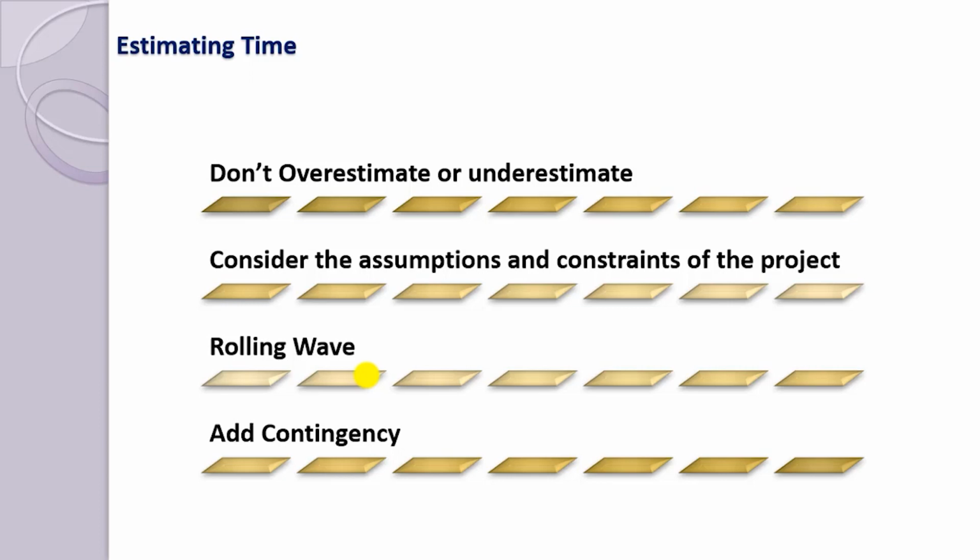There are certain projects which are fixed bid in the scope. Those projects get highly impacted if the estimations are not proper, because sometimes, looking at the higher-level details, we will think that this job can be done in 2 days, but when you go into detail and analyze the requirement, you feel there is loads of work involved, and maybe we estimated 2 days of effort, but it could have been 10 days.